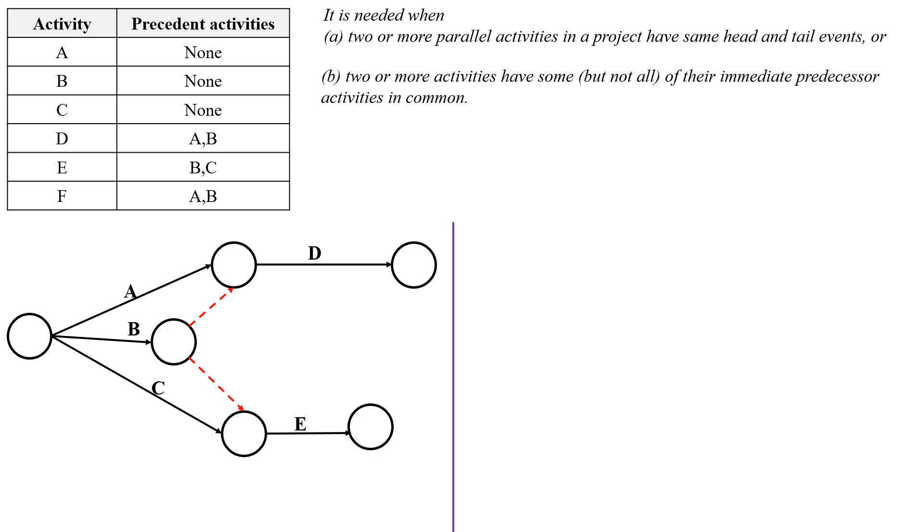Next one is activity F. Activity F will start immediately after completion of activities A and B. So draw the activity F like this. It represents the activity F will start after completion of activities A and B.